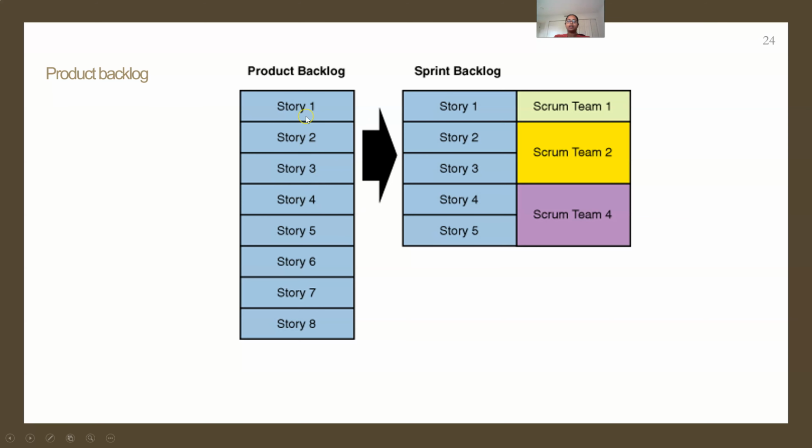The product backlog is a live artifact, that is, it is updated on demand as new information is available. It is cross-team backlog, that is maintained and curated by the product owner between the sprint cycles and as the new features or ideas arise. It contains tasks which were once active in the sprint but deprioritized and moved back to the backlog.